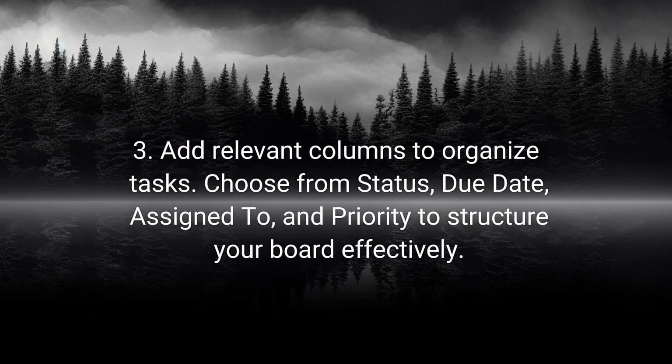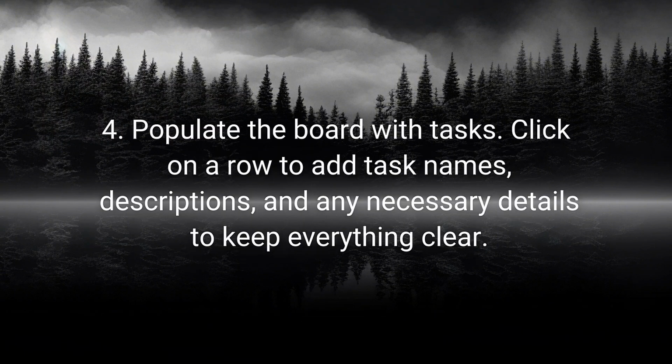3. Add relevant columns to organize tasks. Choose from status, due date, assigned to, and priority to structure your board effectively. 4. Populate the board with tasks. Click on a row to add task names, descriptions, and any necessary details to keep everything clear.